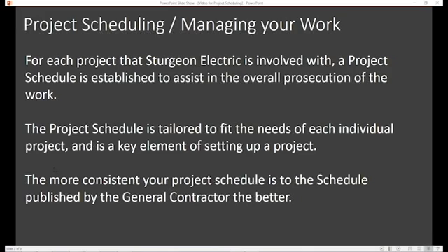We're going to get into that contractually in further discussions, but the essence of your contract revolves around what we're doing here. So if the schedule says we're supposed to do something and we don't do it, we have a problem with our contract and we may be in violation of our contract. So it's really important that we set it up so that the schedule equals what the contract said, so you guys out in the field don't have to worry about that. As long as you make your schedules, you're fine. And if you can't make your schedules, but it wasn't your fault, we'll at least know why.